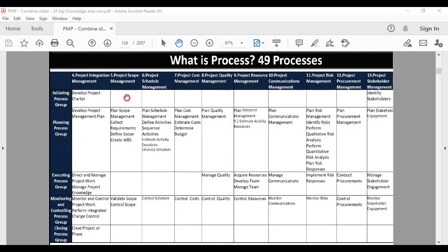Project charter defines who will be the project manager and what will be his authority. Are we working in a matrix organization, a projectized organization, or a hybrid organization? It is signed by the project sponsor. Project charter gives the linkage between the project and organizational strategy. So it is very important that the project charter gets created, and your PMP journey starts with developing the project charter.